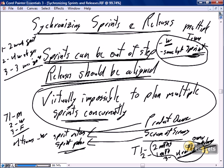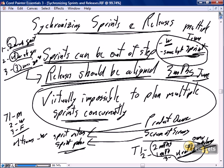So again, let your sprints get out of step, out of synchronization, but pull them back together. In 3 months, at the end of June, we want to focus on having a release. So, team one, if you're working on 2 week sprints, when do you think you would be ready for a release in June? Team number two, team number three. And yes, it may not be ever possible if you've truly got this wide a range in the lengths of your sprints to ever absolutely perfectly align.